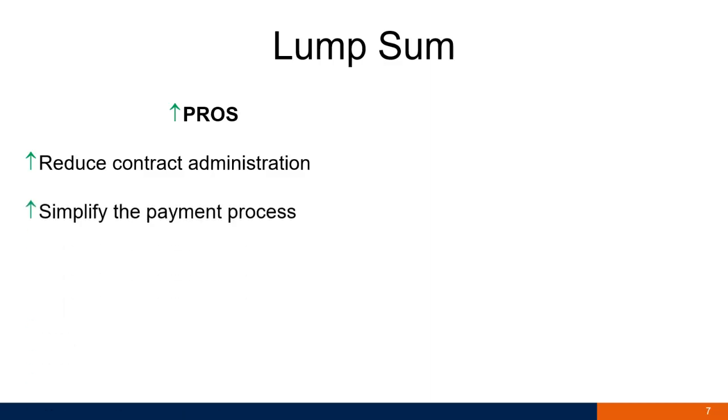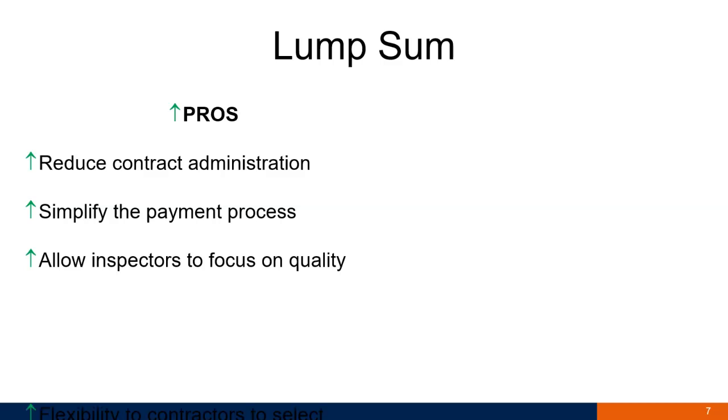It also simplifies the payment process, since it's just one payment. So the contractor will get the full payment at the end of the project, or on a schedule that was agreed upon early, before starting the project. It also, as I mentioned, allows inspectors to focus more on quality instead of verifying the quantities of work performed.